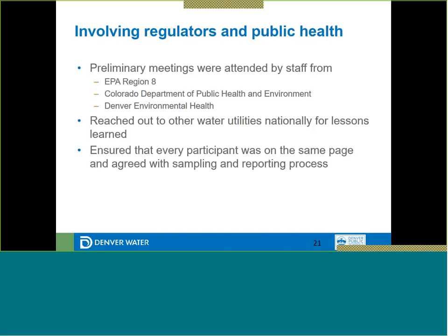One thing that was invaluable was that we were able to talk with several communities where testing had not gone well. And in every instance, this was because of a perceived lack of transparency when the results came back in. It was critical that results be shared very quickly, that problem fixtures were shut down immediately, and that parents, guardians, and school employees knew what was happening and why. Next slide.